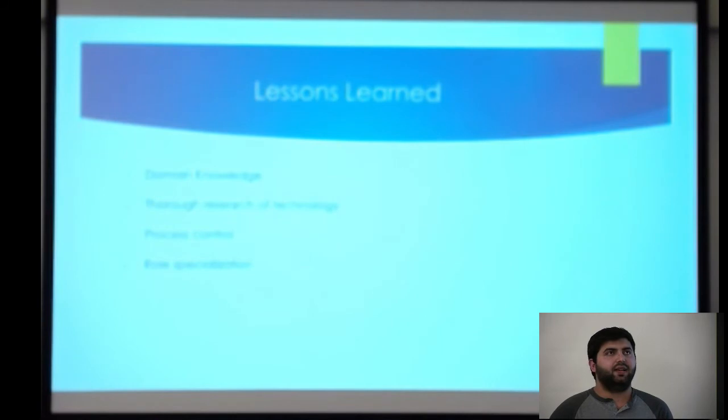Also, process: have a well-defined process and follow it thoroughly. We did have Scrum, and then we switched to Kanban, but because we switched from one process to another and we didn't really fully follow Scrum, we didn't have many metrics to reflect upon. So that's one of the lessons learned.